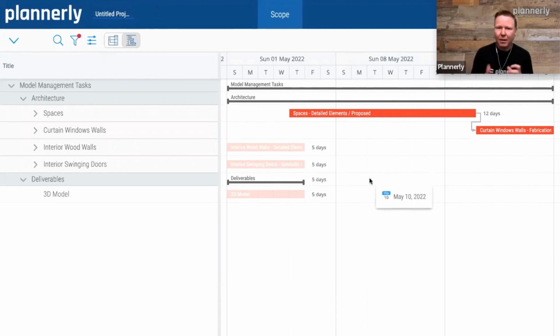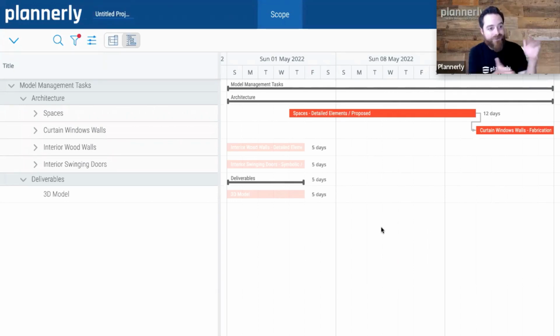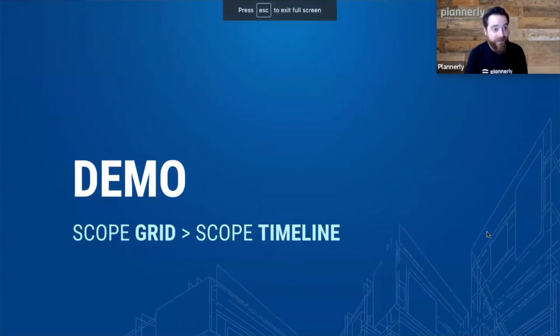So as you think about how you're creating these scopes, it's a management task list, it's a modeling task list. It's by team, it's by milestone, it's by stage, it's by phase, it's by understanding, and there's a lot of interdependencies and a lot of handoffs that are important to be managed. And hence why Louis mentioned me to say, hey, I need to have something before I can do this and deliver it. And that becomes a dependency between those that drives the timeline. Yeah, you don't have to set up different schedules. It's just taking the filters to present it to a client, to your team, or filtering to your specific tasks that you need to focus on. Absolutely.